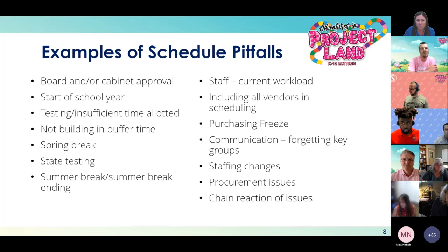The start of the school year, as we all know, is a hectic time. Things can pop up unexpectedly, plans change, and this could cause your schedule to get off track. Testing: insufficient time allotted, meaning testing of the end product or the process or the plan that you are working around during your project. Planning time for testing and/or piloting is important, as this could change your schedule if the result is not what you expected it to be.